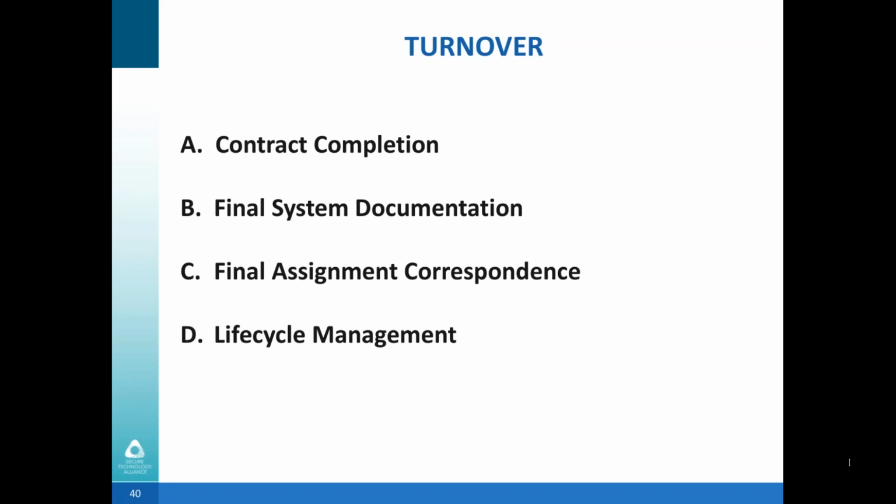This slide shows some typical list of general category items included in the turnover process. Be sure to document key dates and official start of warranty. If partial acceptance was allowed, was it for beneficial use and thus warranty goes into effect then, or was it a preliminary acceptance to allow the contract to move forward and thus one warranty date is to be honored? Whichever it is, all parties should be on the same page.